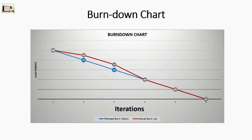It shows how the 100 story points that represents the total scope of work burn across various iterations. As per the plan, 20 story points worth of work will be completed every iteration and all the 100 story points will be completed in 5 iterations.